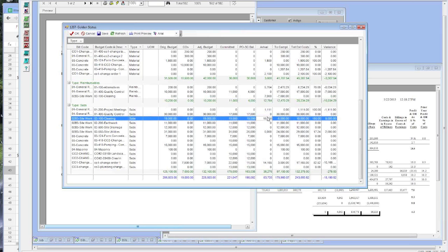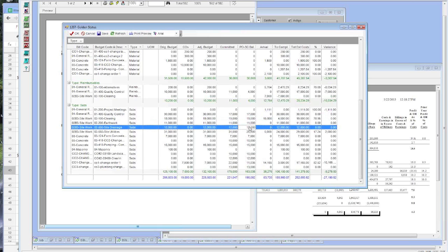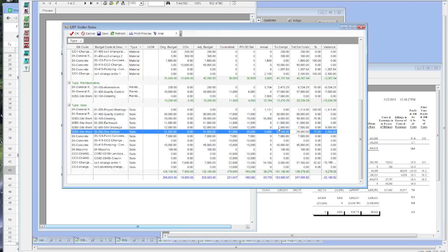Let's say they have 15. Let's go to a different example because that throws us into a negative, or they have a negative to complete. Anything that doesn't make sense. But this is, I think, so that would make sense. We have 19 in commitments. Let's say they have a balance of 12 here, no actual cost, and they say 7,000 to complete. All right, so that doesn't make any sense. So make sure your balance is higher than your total estimated cost. And maybe they've got something to return, or they're going to do a negative change order on that PO. We'll get those posted.